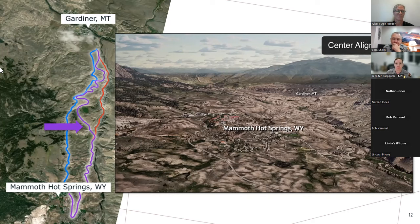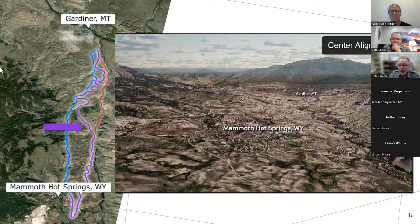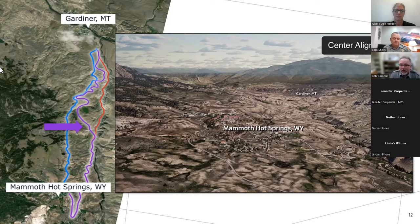Nicole: Thanks, Jennifer. Bob Campbell, the next question is for you: How long would the purple option take to complete? Bob: Right now we're planning on at least a three-year construction timeframe. Three to five years is generally what we're looking at, given this level of design and information.